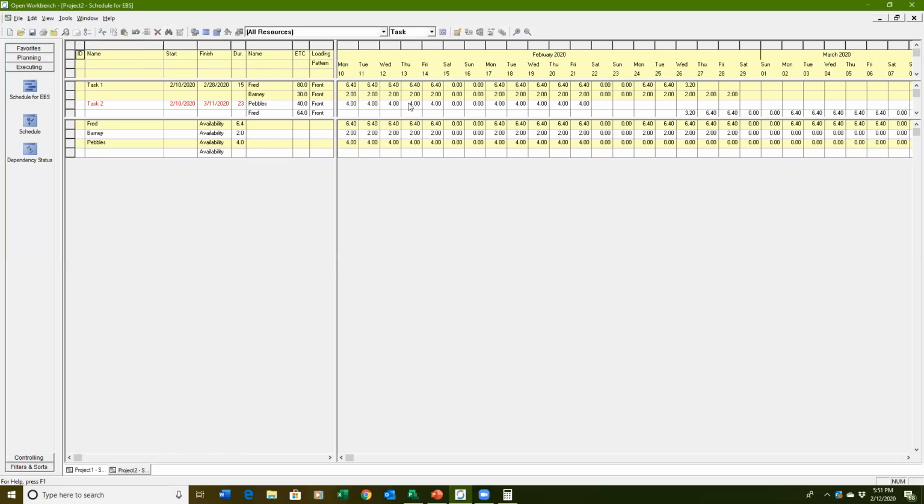I'm working under the assumption that I now need to push out the task because Fred is not putting the amount of time on it that I need him to put on it in order to meet this particular schedule. So ultimately, there needs to be a conversation with Fred and or Fred's manager, assuming I'm not Fred's manager, to say, why isn't Fred putting more time on that? And is he constrained? Now I've got to put in a change request and or manage expectations of management if this is on critical path. That's what effort-based scheduling gives you.